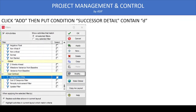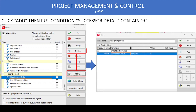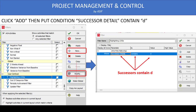When the filter dialog box is open, you add or modify an existing filter. Set the condition so that Successor Activity Detail contains 'd'. This 'd' stands for the time duration unit. So all successors having 'd' — for example finish-to-start with 22 days, 33 days, or 1 day — will be shown in the layout.